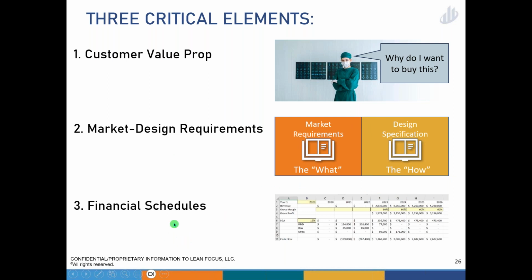And then the third one is financial schedules, which are so crucial to capture at that moment before the project starts, because those are going to be our hypothesis, and our project is going to be a grand experiment that's going to last a year to develop, or maybe 2, and then we have to get it out in the market for a year or maybe 2. And so these financial schedules are how we come back and compare what we actually did to what we thought we were going to do. So few companies keep track of this. This sits on somebody's PC. By the time all this happens, that person might be in a new position or even a new company. Of course, what we're going to be teaching is all this stuff needs to be together in a place that you can find in 30 seconds. Because if we put a hypothesis out there and don't make it, that's okay if we learn from it. It's not okay if we just say, okay, that's all right, let's go do it again.